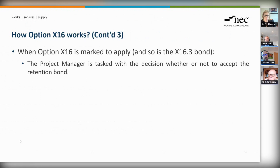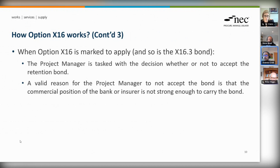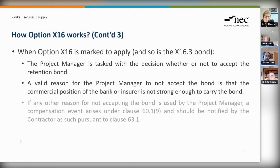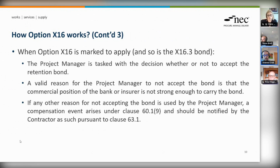In NEC4, X16 allows for a retention bond. The project manager has a decision as to whether or not to accept a retention bond if X16 is stated to apply. A valid reason for not accepting a bond is essentially that the bondsman or bank or insurer is not strong enough — and that is essentially the only reason they can provide for refusing a bond without it being a compensation event. If a bond is rejected for any other reason, that will be a compensation event.